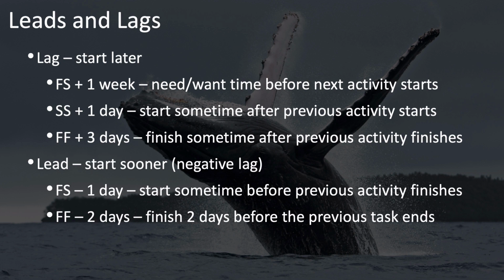So you could have basically 3 crews here working in parallel, but one can start about a day after the other has been at a certain spot, and then the other can start a day after that. So these would be examples of activities that are connected start to start, but with a little bit of a lag, say 1 day, in between each of these teams' work at any point along the railway.